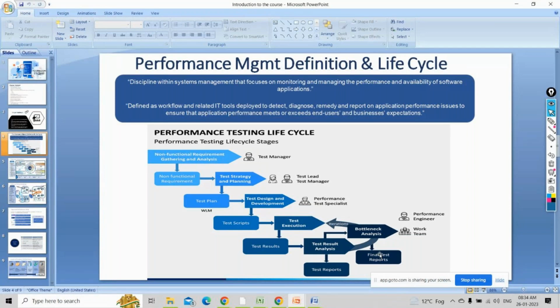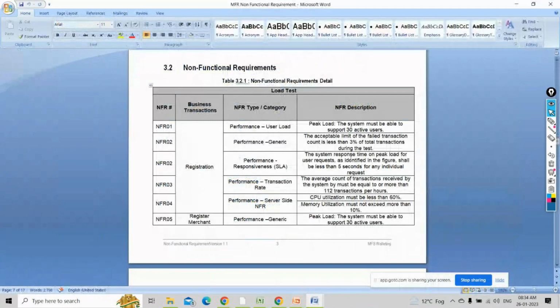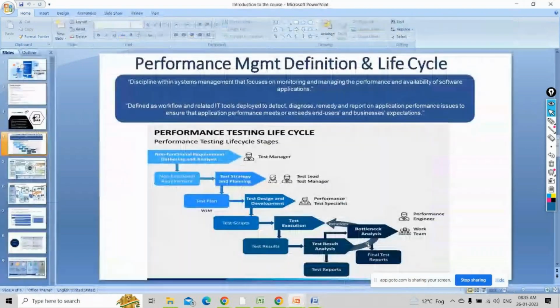This will keep on happening until you reach all of these KPI points, basic key performance indicators. Unless you satisfy this point, you cannot close this project. So once we have met all these KPIs, we are good to close the project, and we can submit the report.